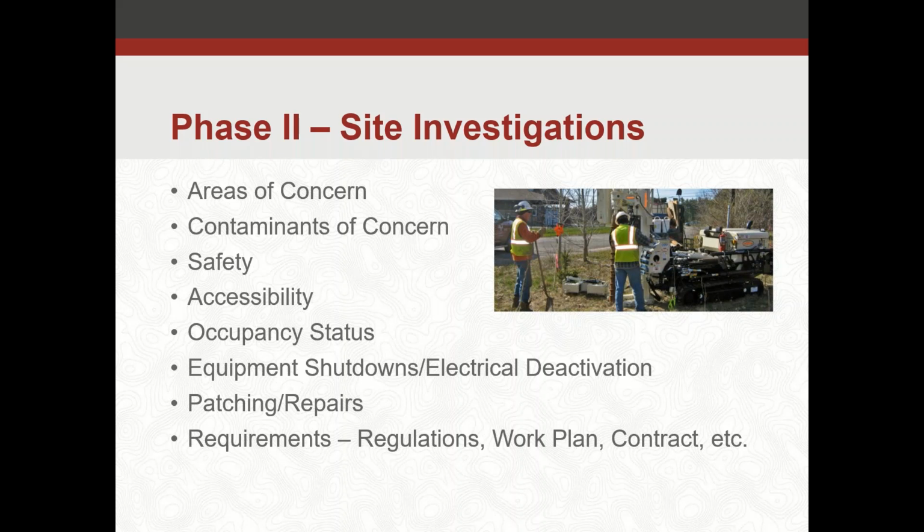Occupancy status of a property is important. Do you have to work around continued operations? Some facilities just can't shut down their operations, so you have to work around them the best you can. And that might, again, lead to some areas where you have to assume a worst case scenario and plan for that until you can get in there and do some sampling analysis.